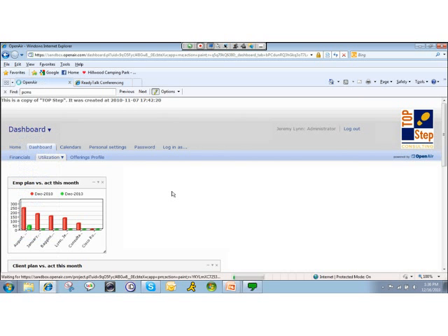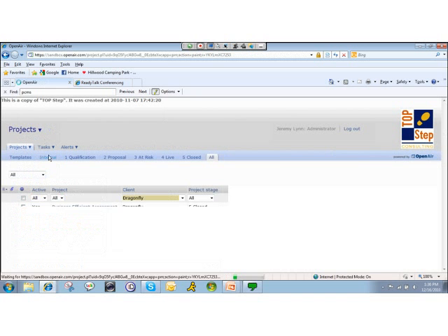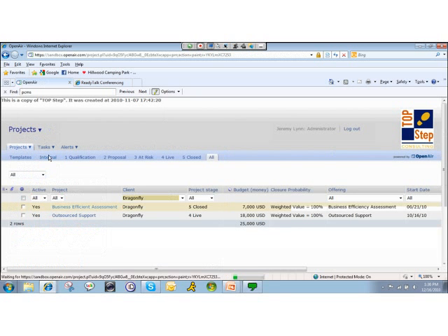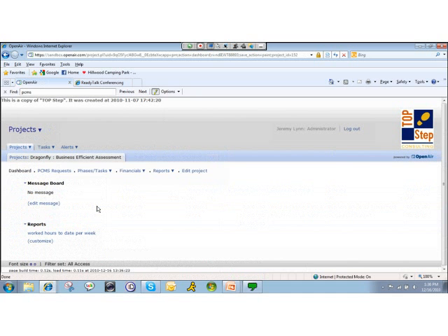If I'm using assigned hours, I know what task I'm on, so a forecast of time based on task filter works fine. But if you're using bookings, you have to consciously want to do bookings at a task level for the forecast to know what task you're talking about. Typically people do bookings at the project level.